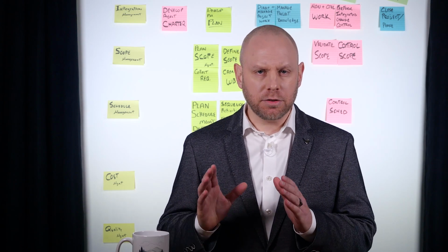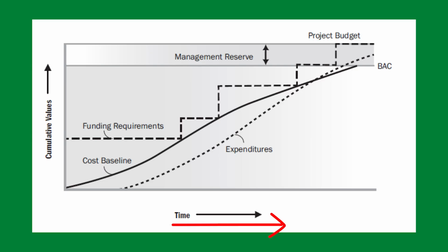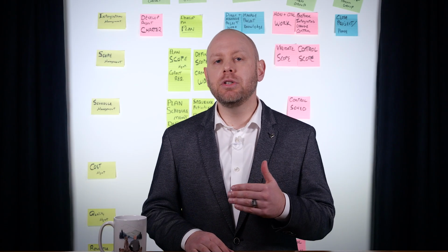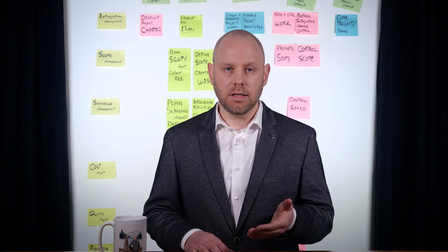This gets into earned value management. So we'll take a moment to describe this. Picture a graph where time runs horizontally and cumulative dollar amounts run vertically. Once we've completed our budgeting process here in a few moments, we'll have established our cost baseline. This is the approved version of our time and phased project budget, excluding any management reserves, which can be changed only through formal change control procedures and is used as a basis for comparison to actual results.